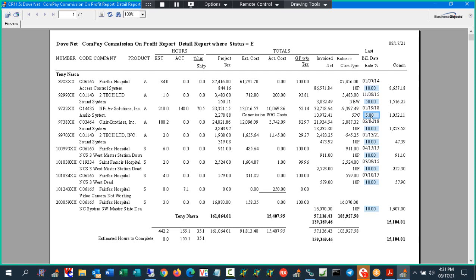How is our actual cost of that project? It's over here. Actual cost becomes real, what we put in. If you were to use the Project System in all its points, i.e., posting labor to the project, posting adjustments to hardware costs to the project, and posting miscellaneous costs like freight costs and things like that, then this report becomes accurate.